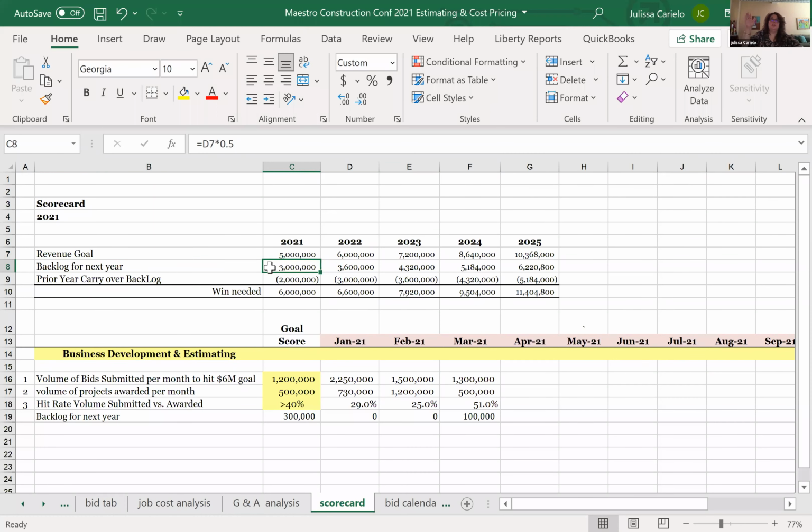So after the rule is from January to June, you're bidding jobs for the current year. From June to December, you are bidding jobs for next year. So that you're able to have 50% of next year's workload already bought out, ready to go. So that you're not saying, I got to get a job and then go work. You're getting ahead 6 months. That is very typical for this industry. And so the sooner you learn this, the sooner you're going to be able to manage that.